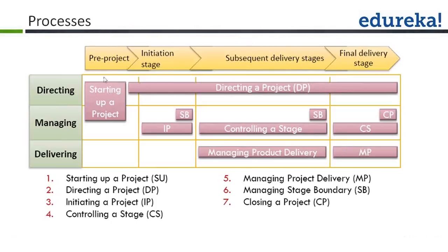And as you see in this diagram, various processes are executed in these different stages. For example, if you talk about pre-project work, the only one process which is executed in pre-project work is starting up a project, SU in short form.